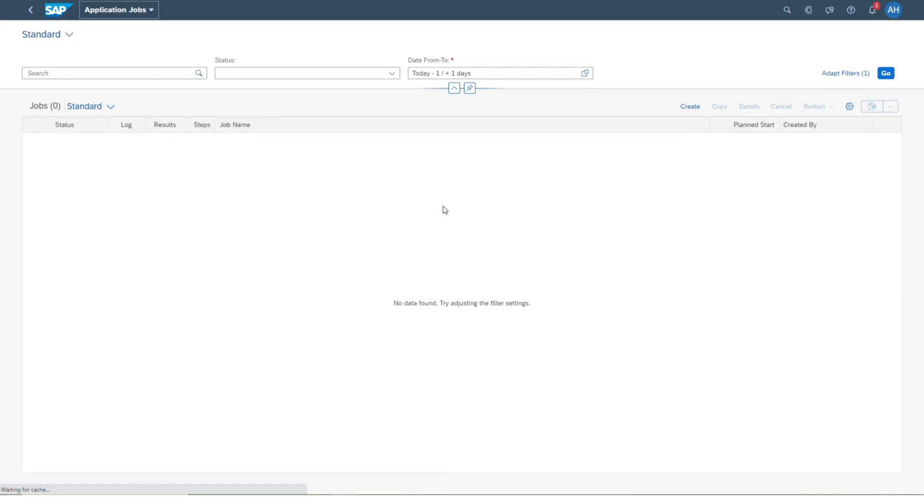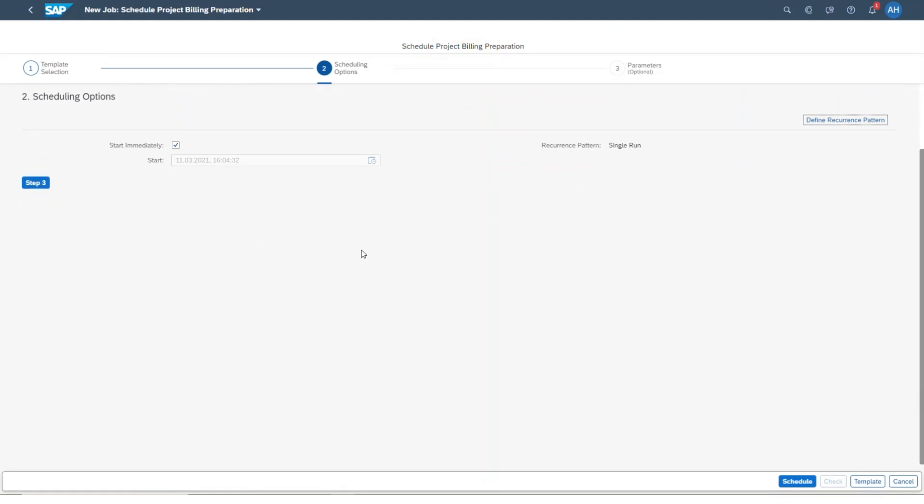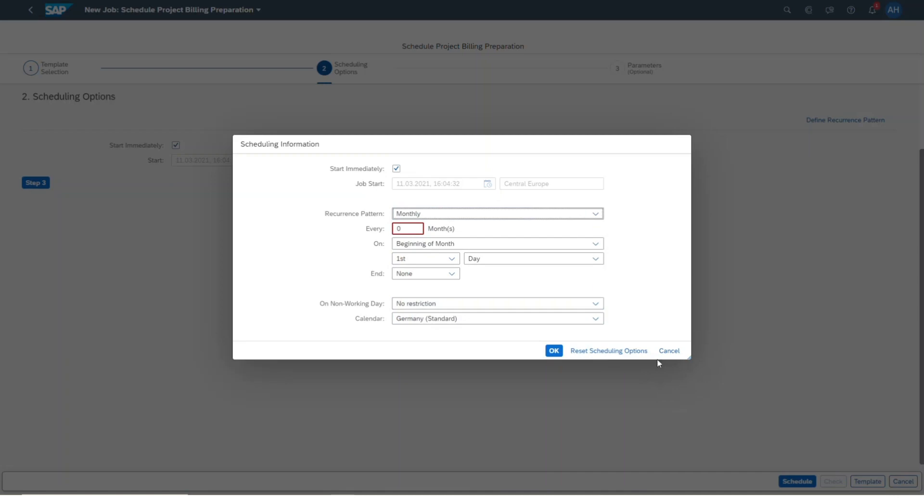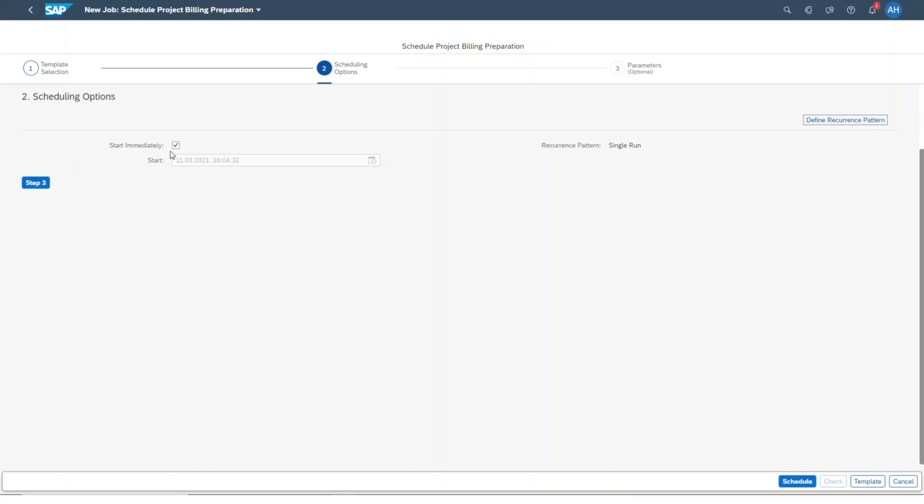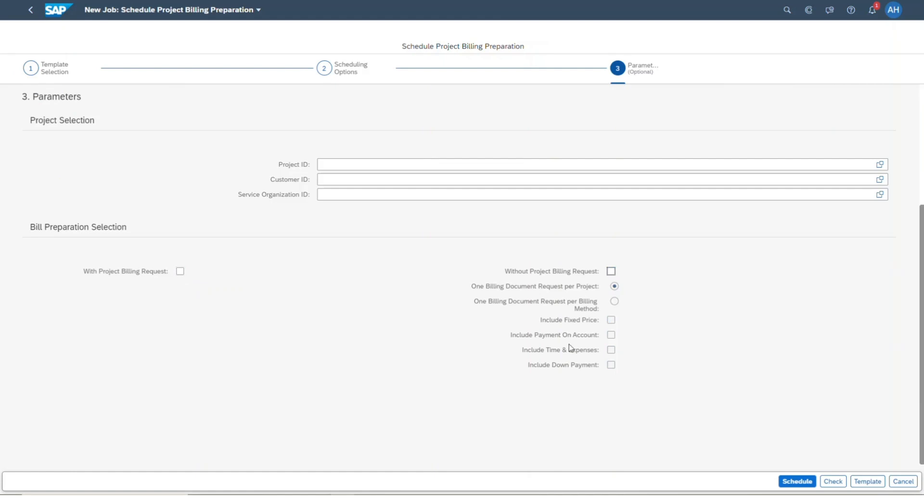Second, I want to point out the new application job. This enables a project billing specialist or billing team member to automate the billing process. With this job, you are able to define automated creation of billing document requests for different billing methods. The user is able to define this automation based on different attributes and therefore does not have to handle all billing document requests individually. Of course, this is of much value in reducing the time and effort needed in the project billing process.